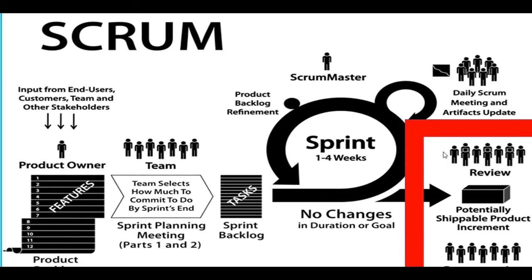If the end user is happy with the development, the complete sprint is going to be closed. Suppose, for one of the requirements, the end user or the client has suggested some changes. Then those requirements will be taken back to the next sprint again, and it will be redeveloped or updated according to the client requirements. Let's directly see how it's going to happen in the JIRA tool.